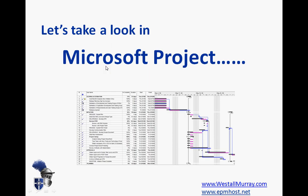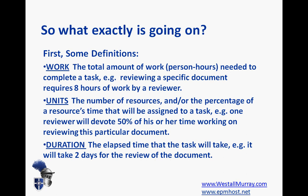So let's go back to our slideshow and consider three terms that Project uses. First, work — Project means the total amount of person hours needed to complete a task. For example, reviewing a document might require eight hours of work by a reviewer. Units, another Microsoft Project term, refers to either the number of resources or the percentage of a resource's time assigned to a particular task — for example, one reviewer might devote 50% of their time to reviewing a document. And duration is simply the elapsed time from start to finish that the task will take — in this case, two days.